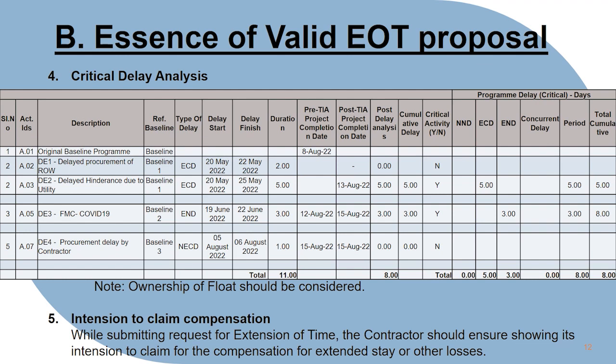While requesting extension of time, the contractor shall also submit its intention to claim compensation for extended stay or the other losses incurred by him. Ownership of float shall also be considered while performing delay analysis. We will deal with this topic in a separate video while explaining delay analysis. As of now, you should understand that the float is owned by the project, meaning the delay on a non-critical path shall not be considered unless and until it creates a new critical path.